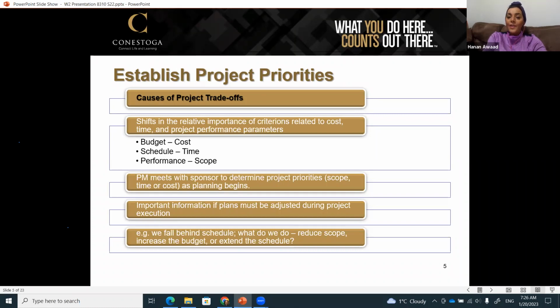So, for example, this AI integration that the group recommended might cost us a fortune, and we are not ready to implement this. Or, yes, we have the cost, we have the means, we have the resources, but we don't have the time. We need to relaunch our website in 2 months. So that's why when we establish the project priorities, we understand what we can do and what we cannot do. And these we call trade-off. We trade this with another thing.